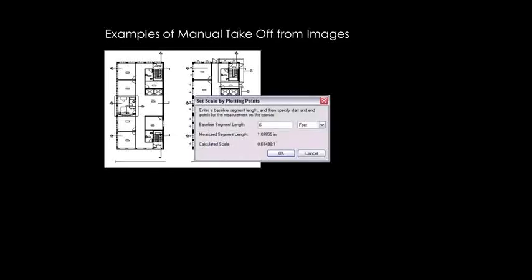One of the best things is the ability of scaling your images to real scale. Again, if it's images, you're kind of estimating, so it's not an accurate science. I wouldn't say eyeballing, but you're still not snapping to anything. It's not a vector like AutoCAD. So if you're using PDFs, you can bring them in and scale them using reference points. Knowing only one dimension in your plan or elevation will help you tell what the distance is.